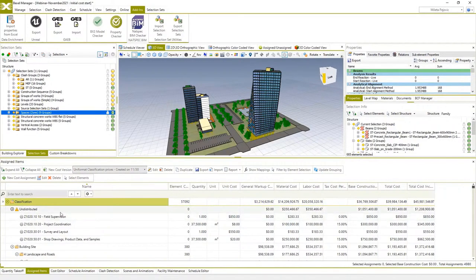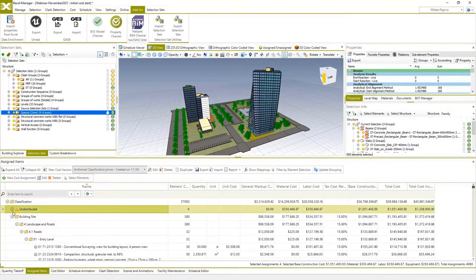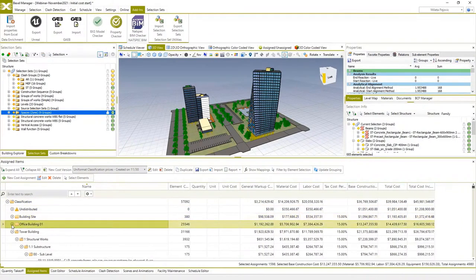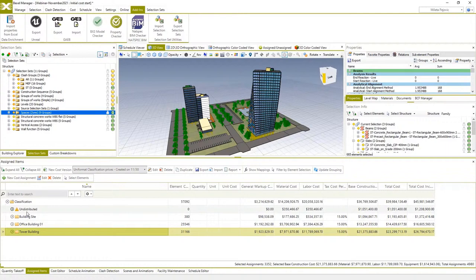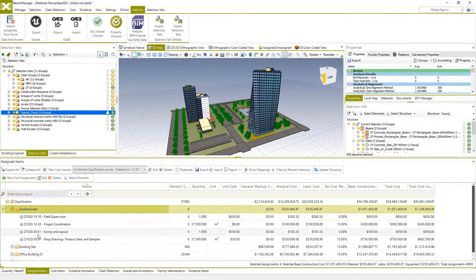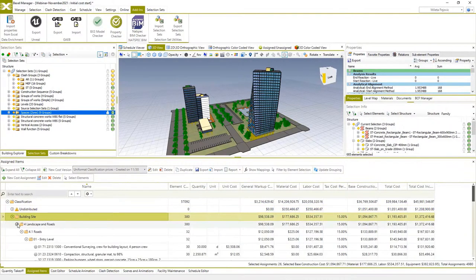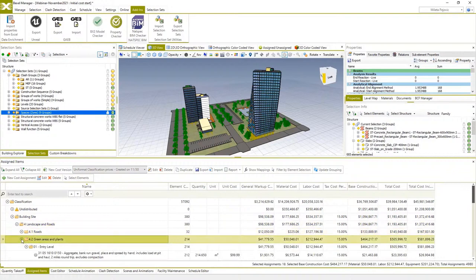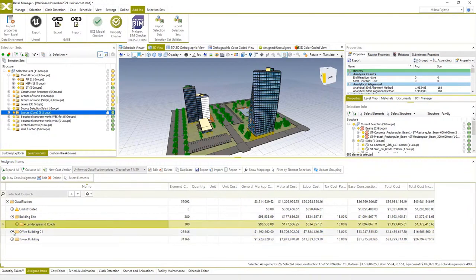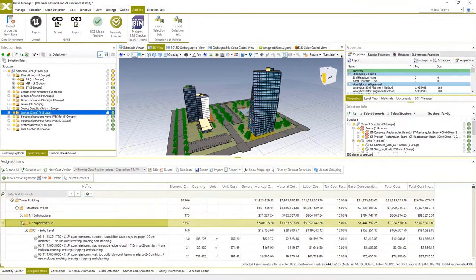So now the system created a new breakdown structure for the entire bill of quantity based on buildings and then group of works and levels. Undistributed cost items in this case are for added non-beam related cost items since they don't have relation to beam elements or buildings. All other items are organized as we wanted, as you may see, and we can now select or review cost items and elements much easier.